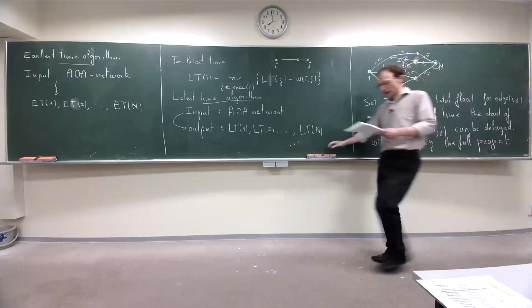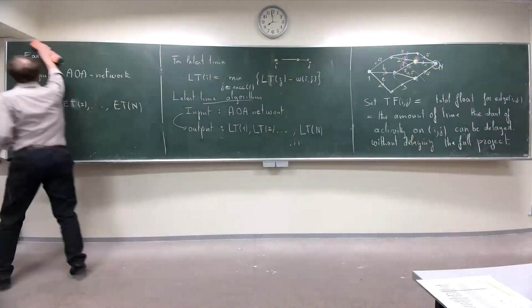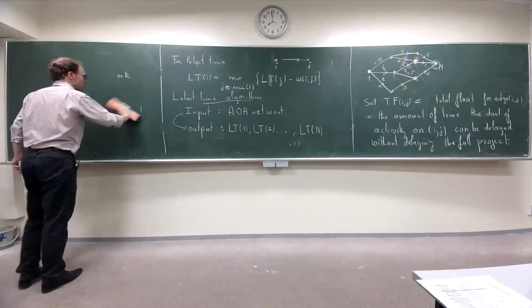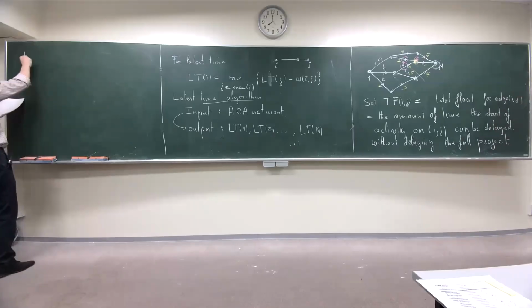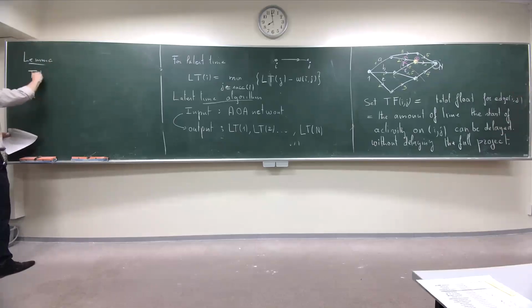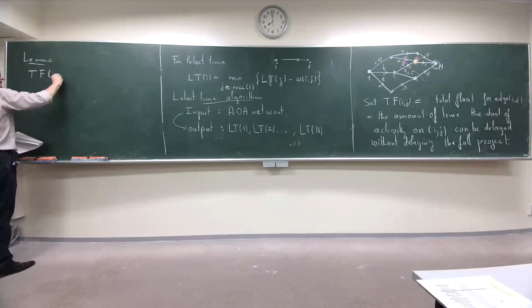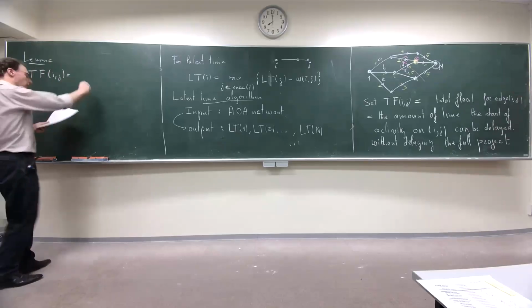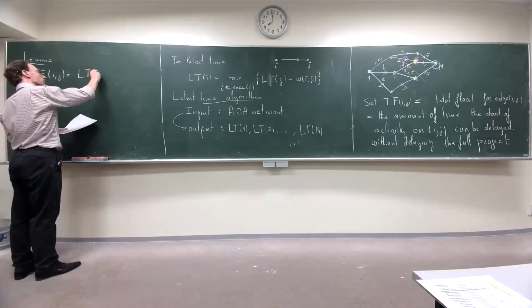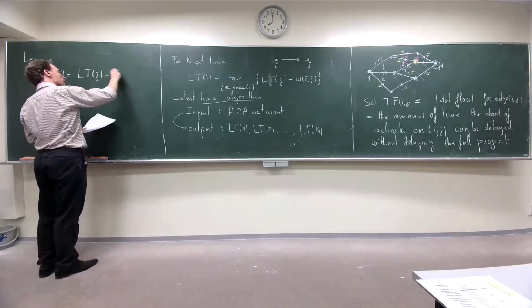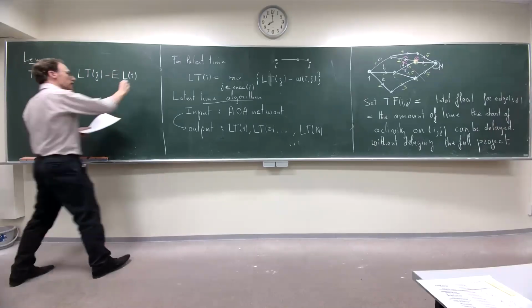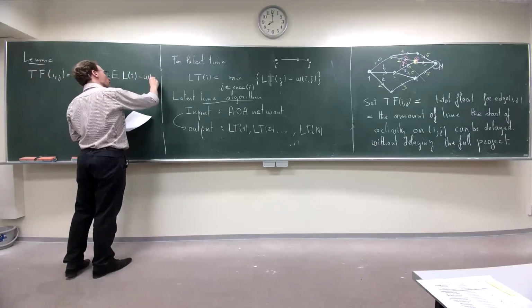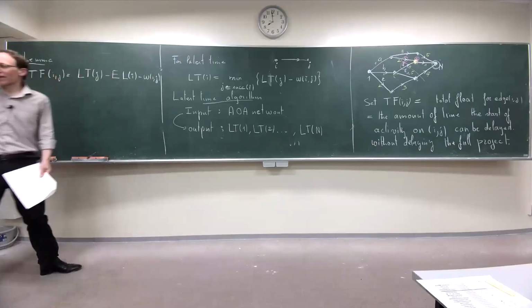And this is the final lemma for today. There is a way to compute this with the ingredients I mentioned before. It would be nice if somebody proved this. I don't think I put it in the notes. The total float for the edge IJ is equal to the latest time for J minus the earliest time for I minus omega of IJ, which is not completely surprising.